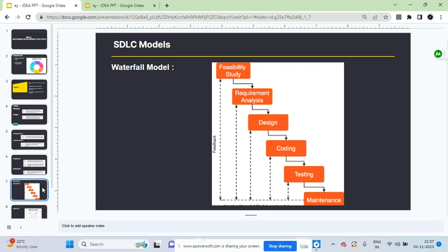This is the waterfall model. It is one of the first models for SDLC and is very simple and popular. It's also known as the linear sequential lifecycle model, and in this each phase must be completed before the next phase begins, so there can be no overlapping between the phases. Conceptually, the design flows from one phase down to another like a waterfall.